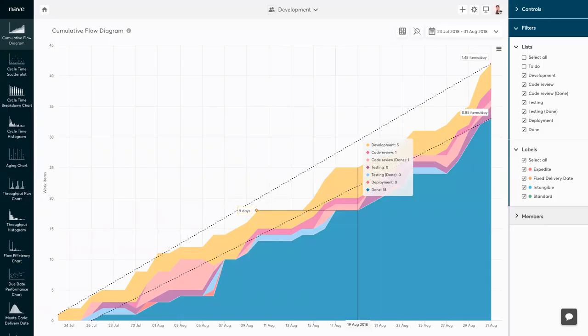How do you know how much is in progress and how much is actually being done? The cumulative flow diagram provides an overview of the current state of your process by tracking the total number of tasks in progress each day. The graph is built from colored bands, with each band indicating how many tasks are present in each process state. You can also see the accumulated number of tasks completed in the selected time frame. The horizontal distance between the top and bottom line of a CFD area at any point is your approximate average cycle time. The CFD also enables you to spot bottlenecks instantly.